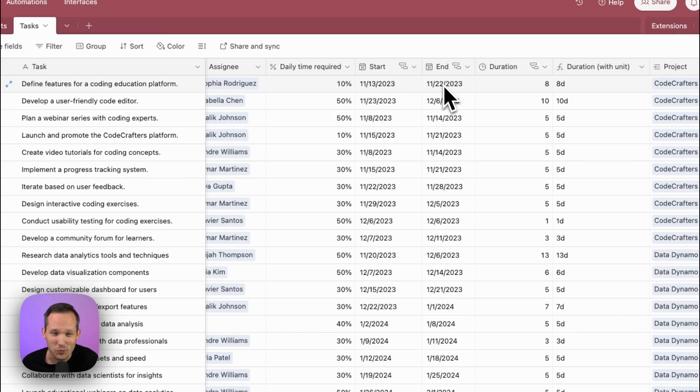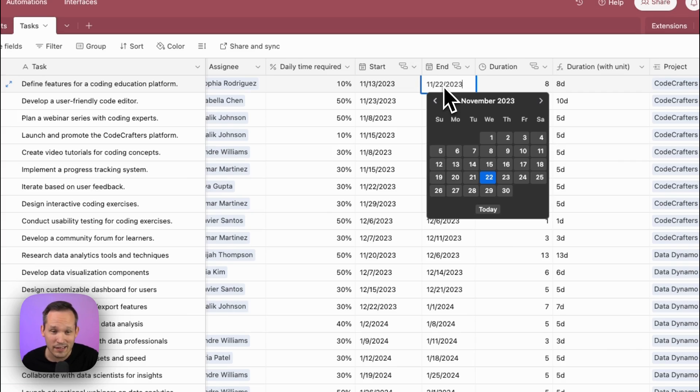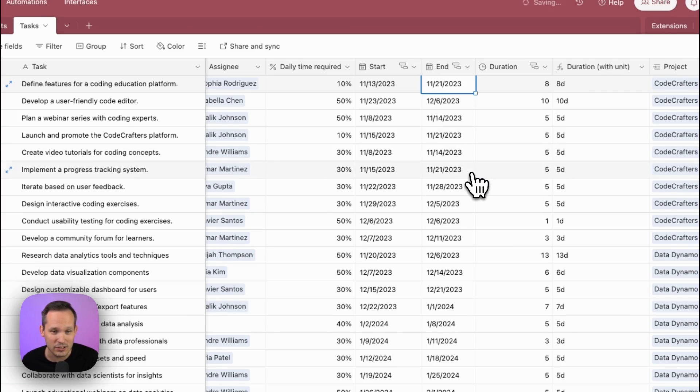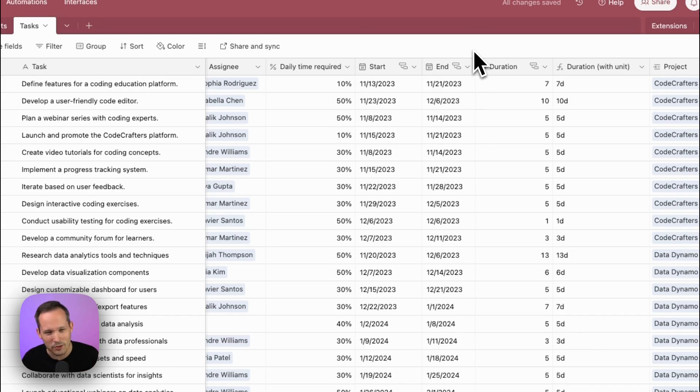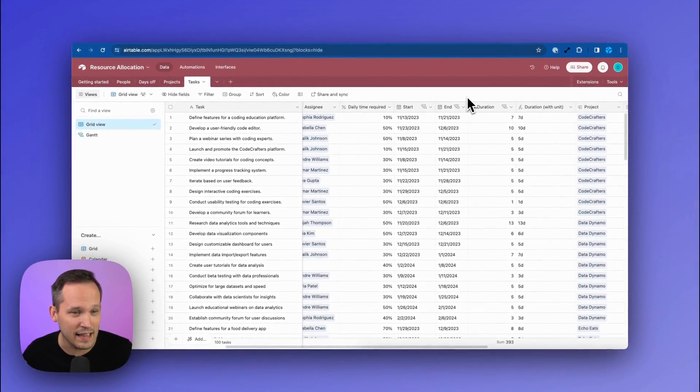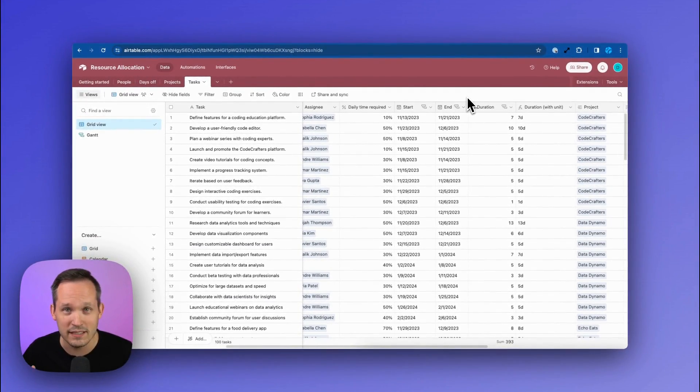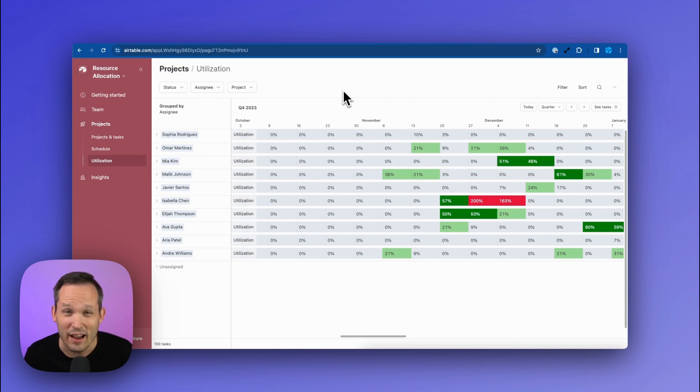Now I will say it doesn't work the other way. So if you said, hey guys, I told you the 22nd, but we actually got it done an extra day early, so go ahead and get started, it's not going to then shift that back. So that's my only complaint there. But it's really exciting that now we're able to take these dependencies into consideration, regardless of what view we're operating from.